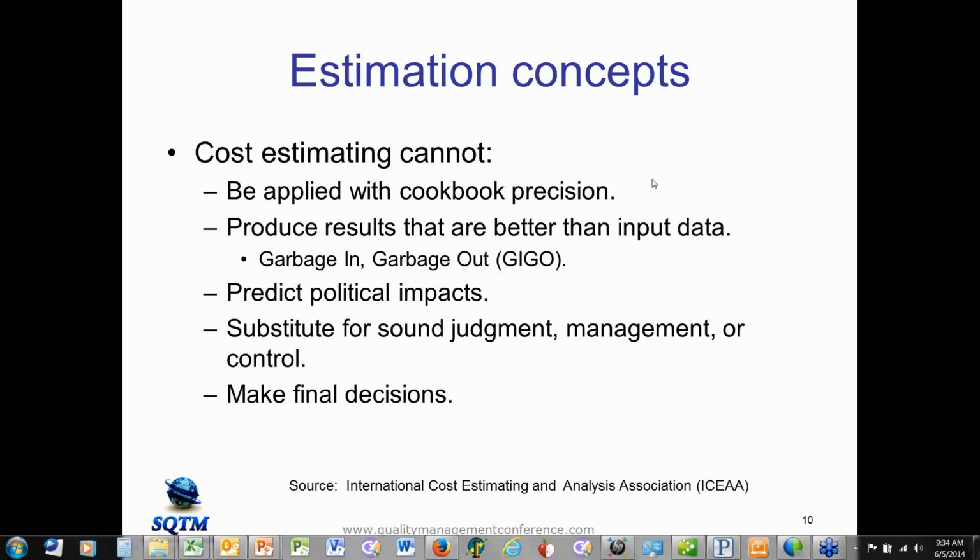Now let's say I've got 5 projects, and let's take the linear case first because that's the easiest. Say on the first project they did 5 pages and spent 50 hours of work. It's fairly straightforward: 50 divided by 5 is 10 hours per page.